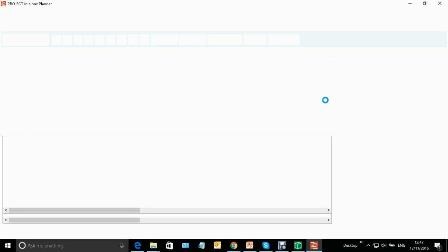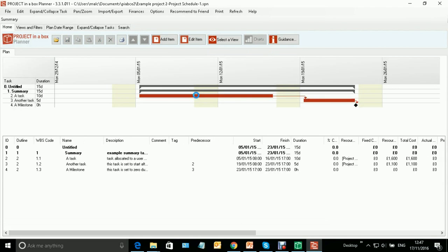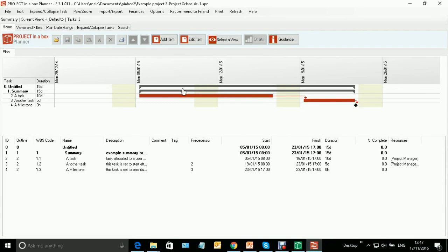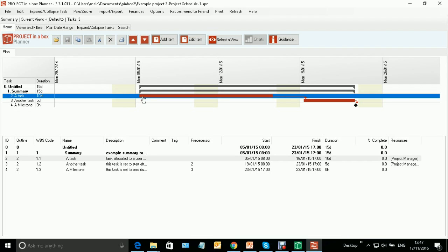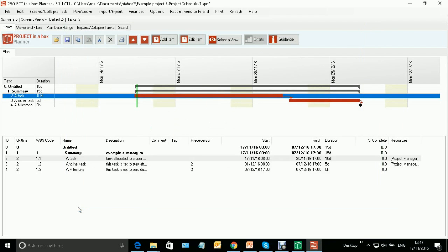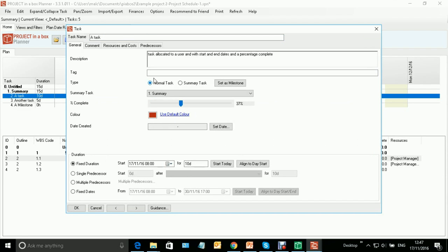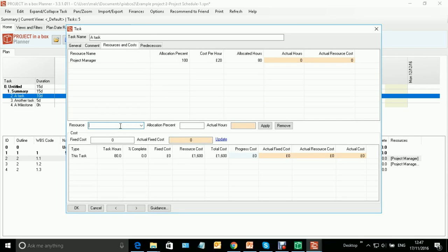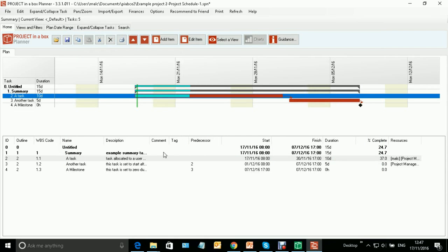Of course, as we talked about before, you can have a combined schedule and risk register and issue register. Here of course in PRINCE2 it's all broken down and they're dealt with in different places. We have them as separate files. So I can very easily come to here, open my plan, come to the task, make it start today like that. I can then, if I want to, go back in it and adjust its percentage complete and come to the resources and say let's add me to this task, and I can just start to do my planning straight away, adding new items into here, copying groups around, just building up my plan in the normal sort of way.